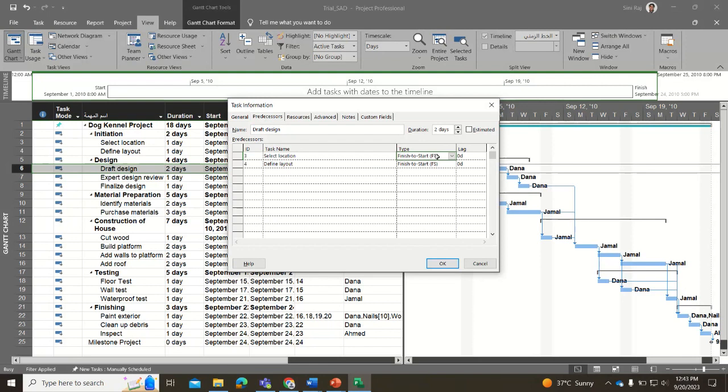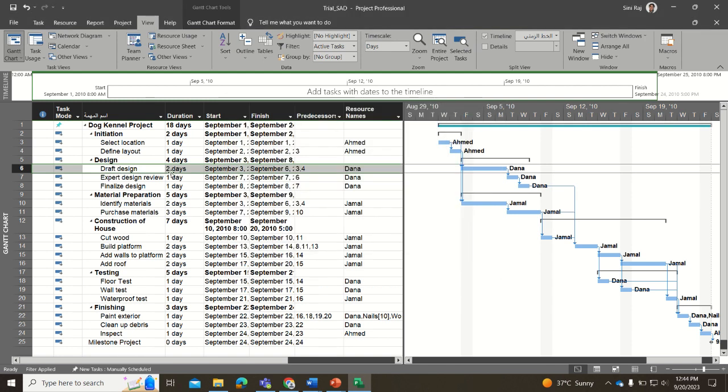So when you look at this here, you can actually select whether each one is finish to start, or whatever be the type of the dependency, you can mention the type of the dependency. And if you want to have any lag or anything like that in your designs, you can put it here. Okay, so this is nothing but the finish to start dependency. This is how you will implement the dependencies in Microsoft Project.